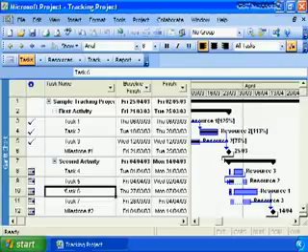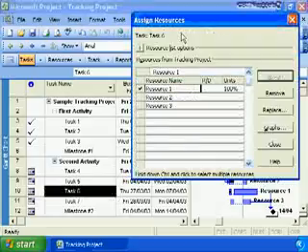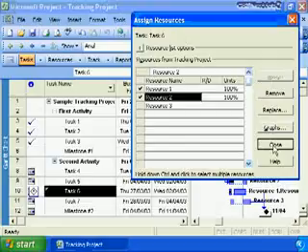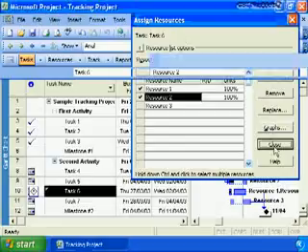Resource assignment during delivery is the same as resource assignment during initial setup. We will go to this button, Assign Resources. We'll see the original assignment of resource number 1, and let's add a second resource to the task as well, and we'll assign resource number 2 to that as well. We can see instant result. The task has been shortened because we now have 2 resources working on the task. And we look at our end date, it's gotten a little bit better.